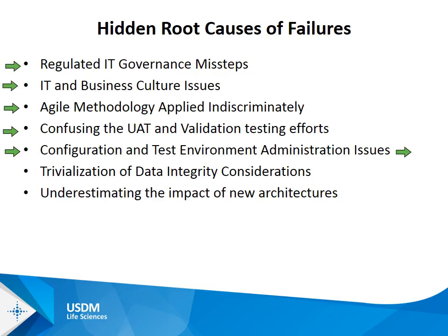We see people as well, because they're now moving to the cloud and they're interacting with SaaS organizations, they're being charged for each environment that they have. So we're seeing people just do development and validation environments because it's cheaper, and they think they'll use the production environment. The test, development, and production environments, I should say, often skipping a separate environment for validation or for staging, for user testing, or for training purposes. And we often have seen that people suddenly realize they need a new environment, and it's a complex process to create it.